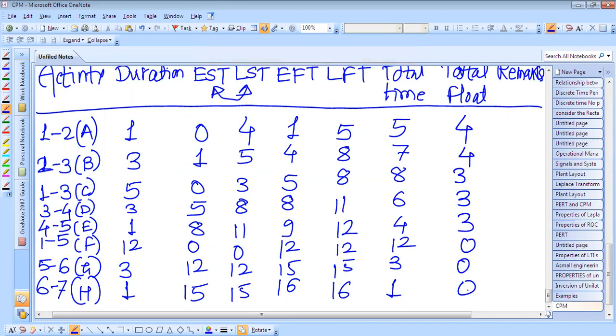Now, any remark we have to mention here. So from this, the analysis table recognizes the critical activity. We have to recognize which one is the critical activity. So the activity with 0 float, which is marked on the arrow diagram, and the critical path 1567 is established.